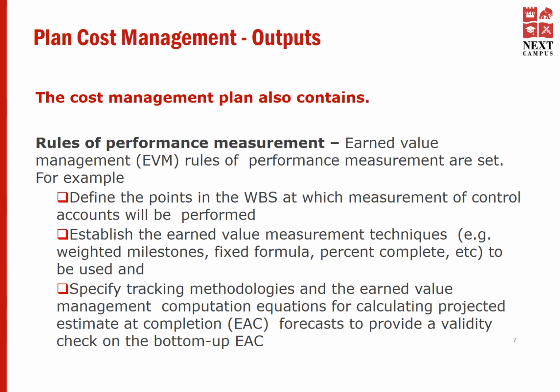The cost management plan also contains rules of performance measurement. Earned value management rules of performance measurement are set. For example, define the points in the work breakdown structure at which measurement of control accounts will be performed.